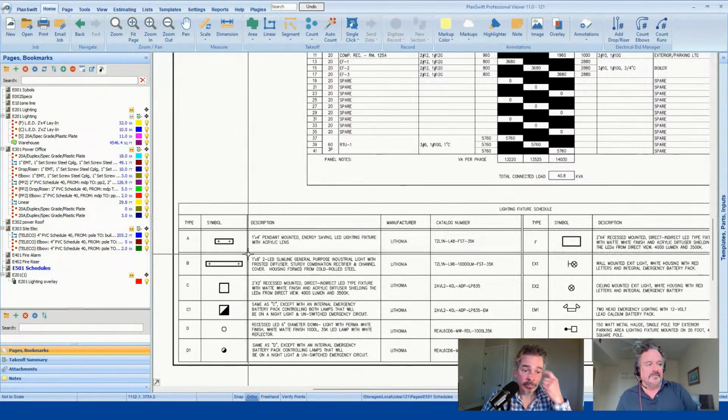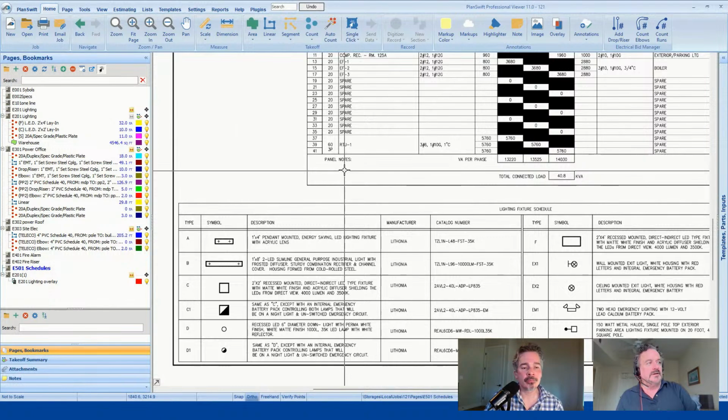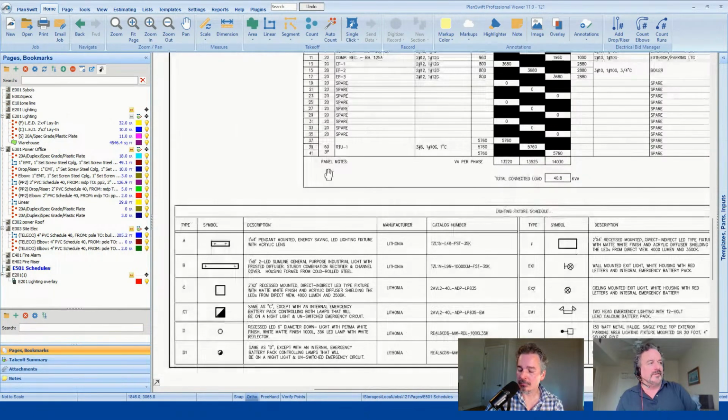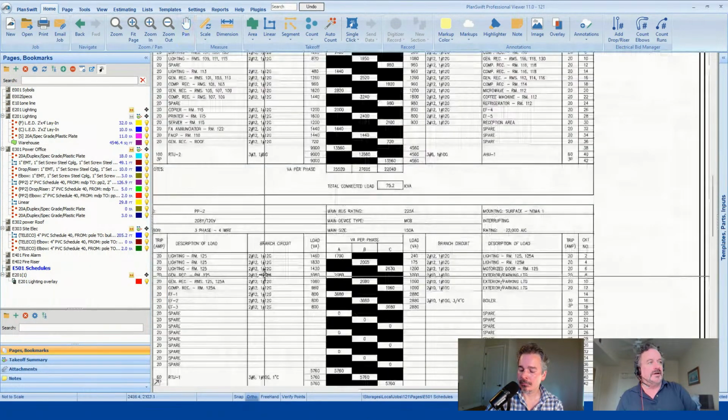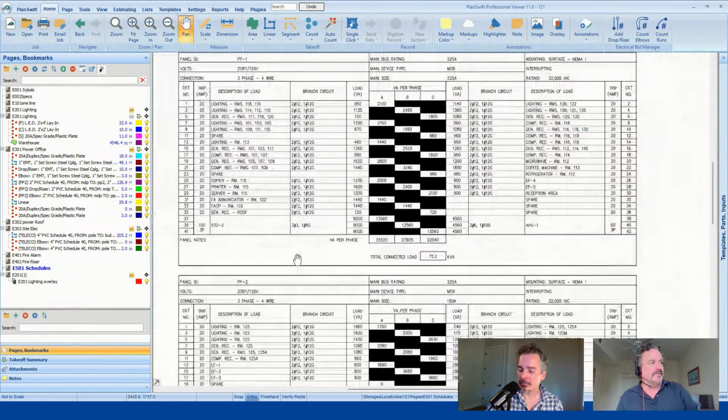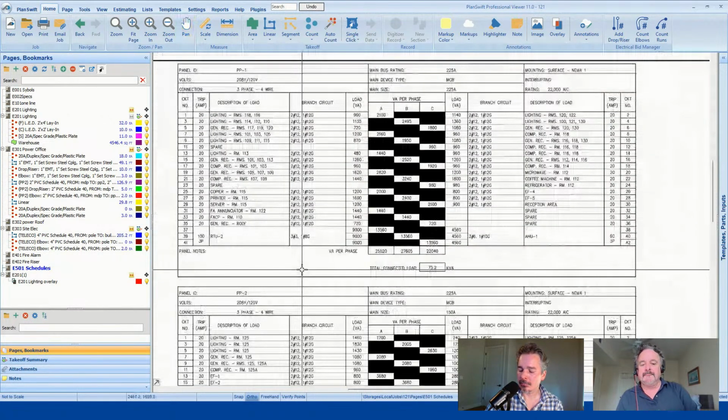EBM takes care of the counts that you put in, and it takes care of the labor on all those items, but you're going to need to get a quote from your supplier on those types of items. So it's appropriate to send them the EBM reports and the sheets from the drawings that they need to see to give a quote to you.